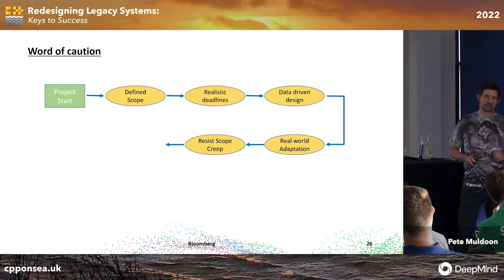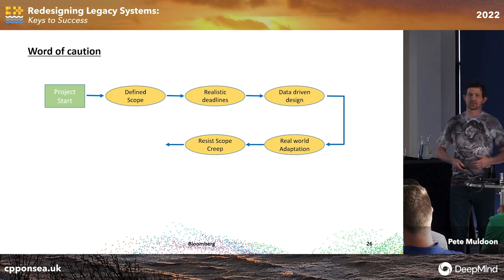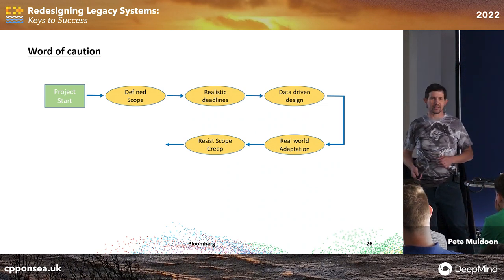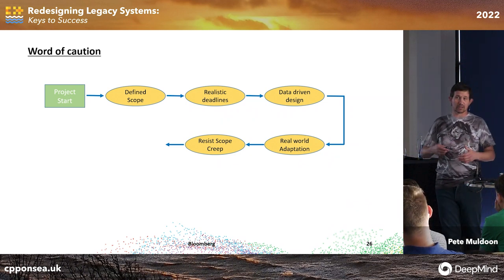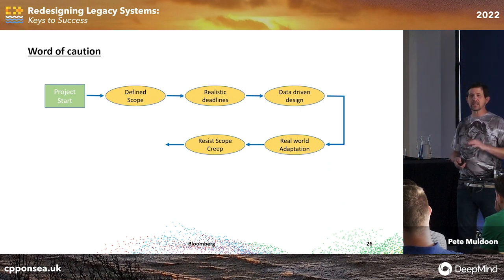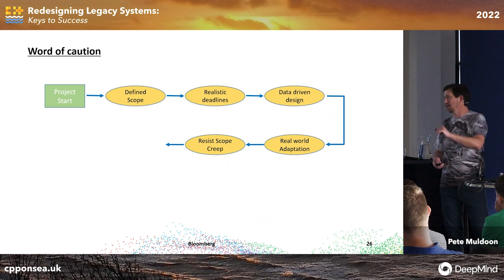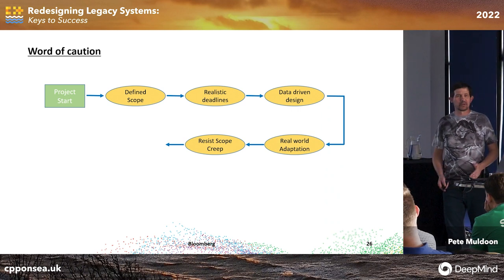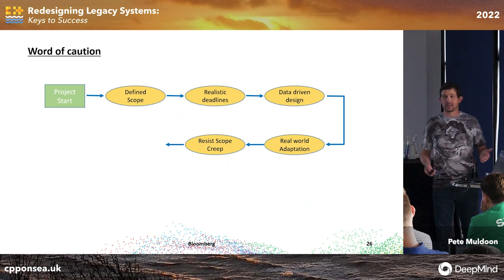Resist scope creep, right? Hey, why don't we just do this? Why don't we just do that? And even your own developers will say, you know what? I'll make something really generic and really extensible. It's like, man, that's going to be hard to test. And it's much more complicated. Why not make it simple now? And you can, with some extensibility left in it, not that it's a complete hardwired option, but let's only solve the problems that we're looking at today, not the ones that are coming along in phase two or phase three. Oh, phase three, this is what we're going to be doing. Coding that up now. Why? We don't even have a deliverable out the door. And this can derail us getting out the door in the first place, which means there won't be a phase three.